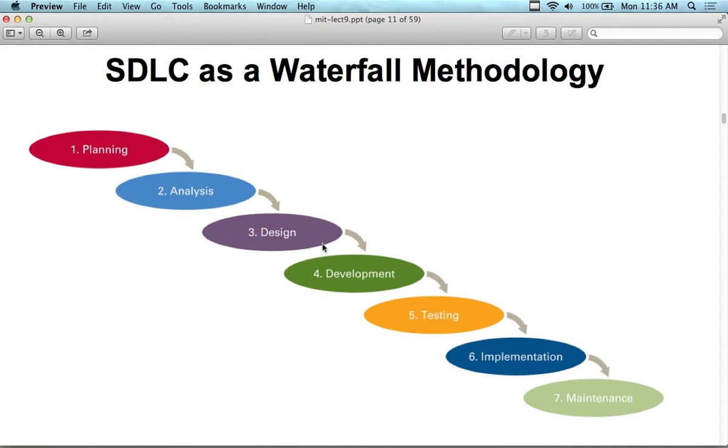I'm just joking. I actually think this is a good model. One problem with this model is that you don't see anything until step 6. So if this software project took 1 to 2 years to develop, which most big projects do, do you think your customer is going to be happy with you if you haven't shown them anything for 2 years? Hey, look, it's coming out soon. Maybe next year you'll see the prototype. What? How come I can't see it today? So the problem with the model is a late deliverable of the actual system.